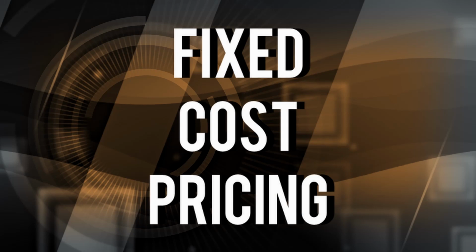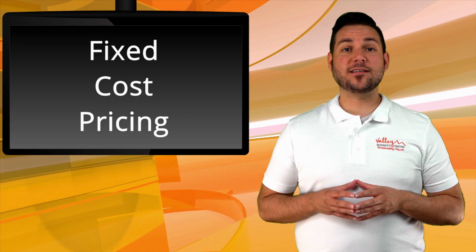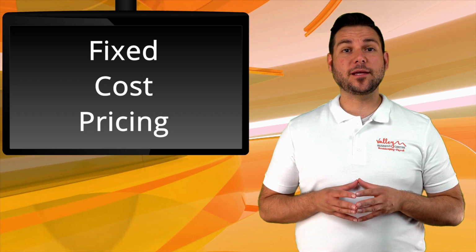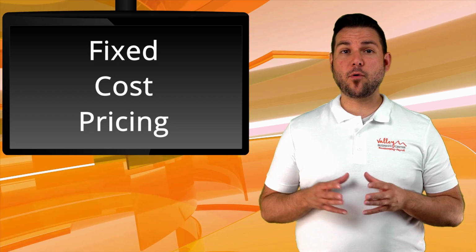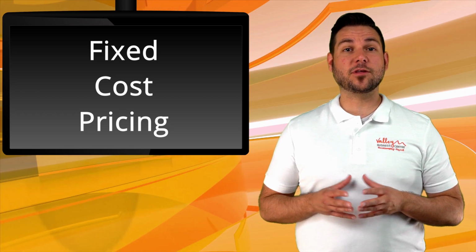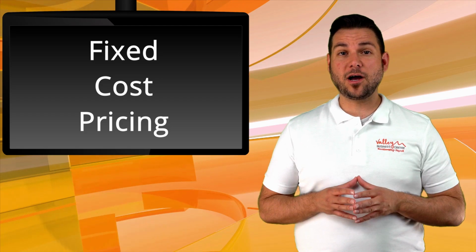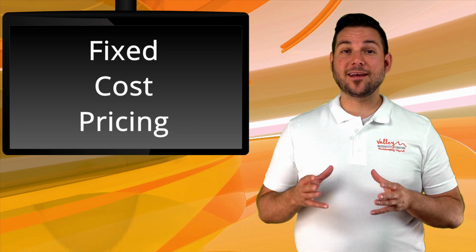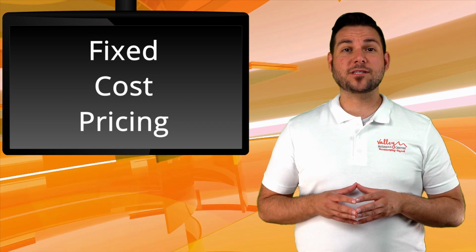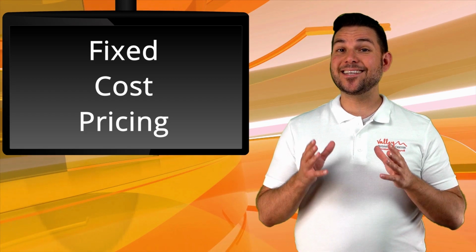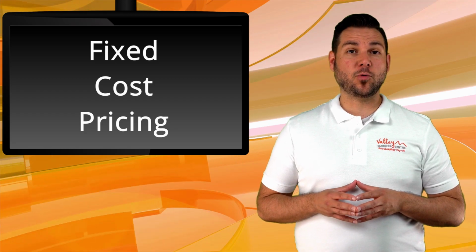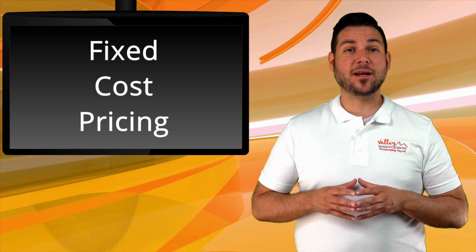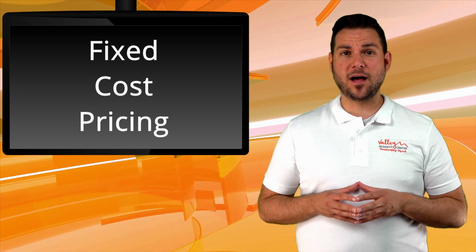Fixed cost pricing. This is based on a detailed estimate that presents the total cost of a project in its entirety. Progress billing is based on the percentage completed to that point. If you're a builder that consistently puts out the same project and you know all of your exact costs, this can work for you. Cost overruns can happen because there are other variables that cannot be controlled. For example, weather or site conditions or project material costs can skyrocket. Situations like in 2020 with everyone doing renovations, lumber was continuously changing in cost, and not to the benefit of the builder, who may have already set a fixed cost.